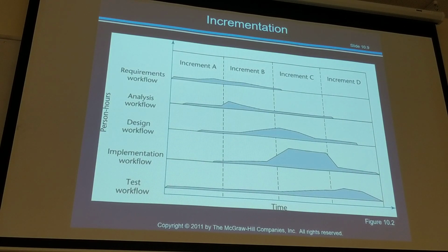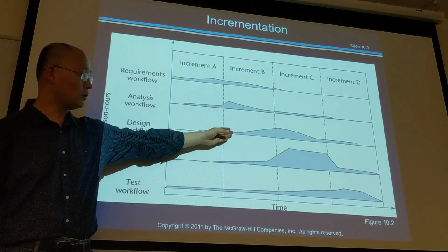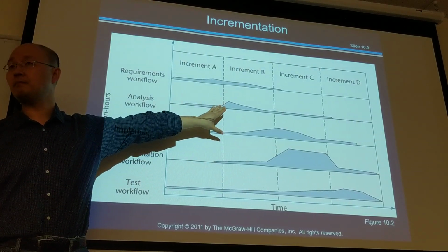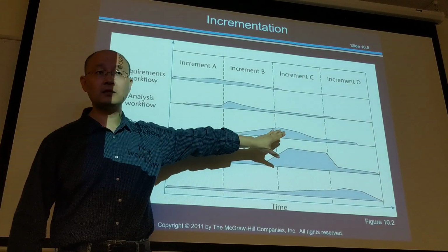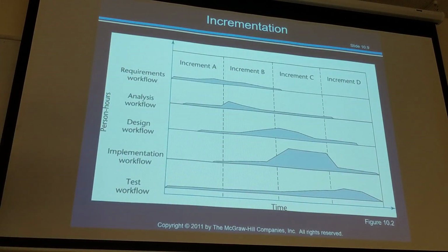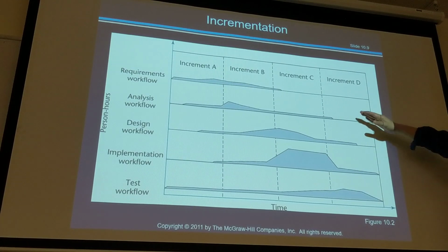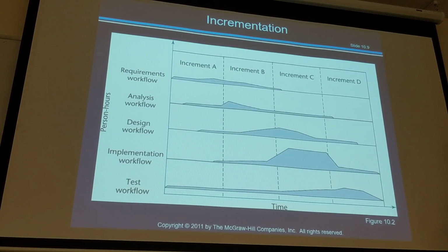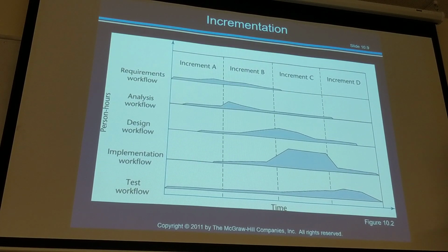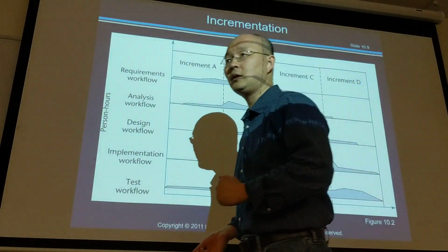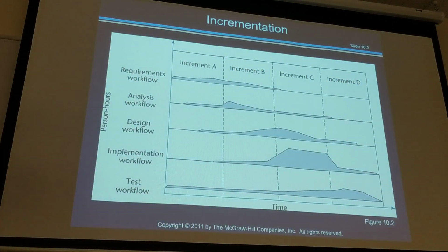Okay? So as you gather more information, you start spending more time on design, and then it's stabilized. Your customer is not making so many design changes. You can finally focus more on the implementation side and testing. Once that's done, and you are happy with all the features, then you have to wrap up your project by doing a lot of testing, alpha testing, beta testing, acceptance testing, to deliver your product to your customer.